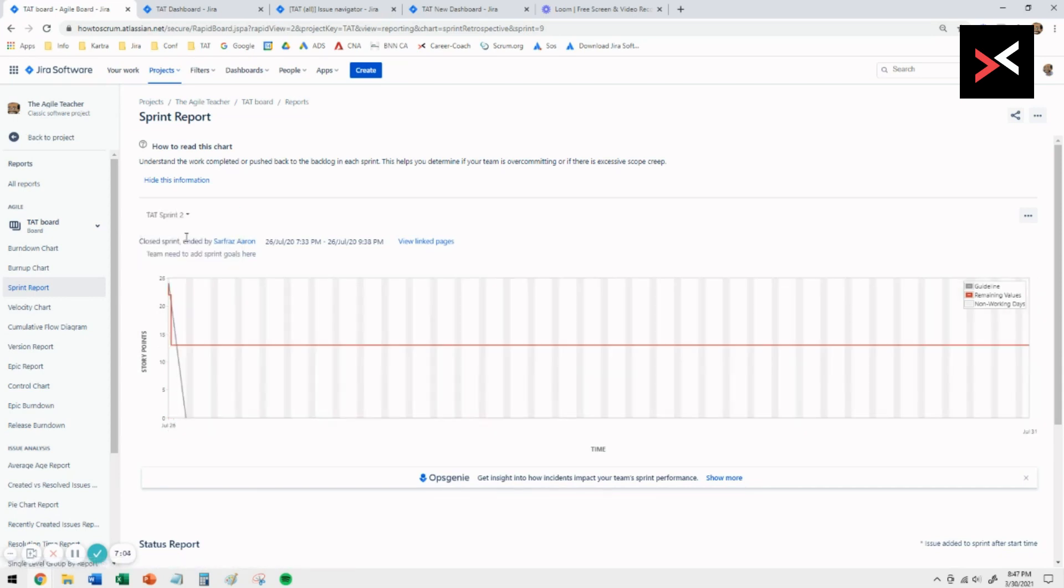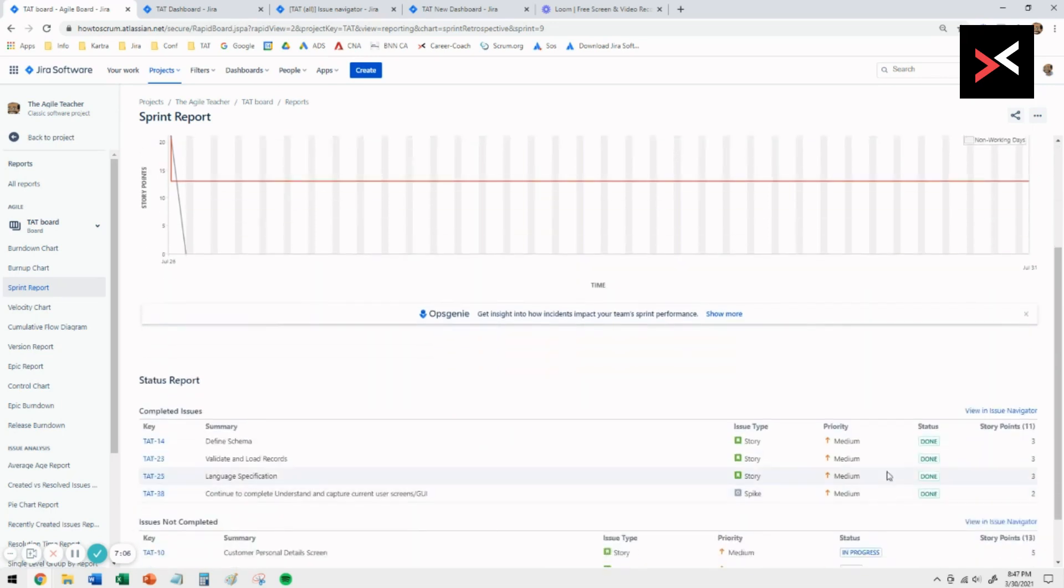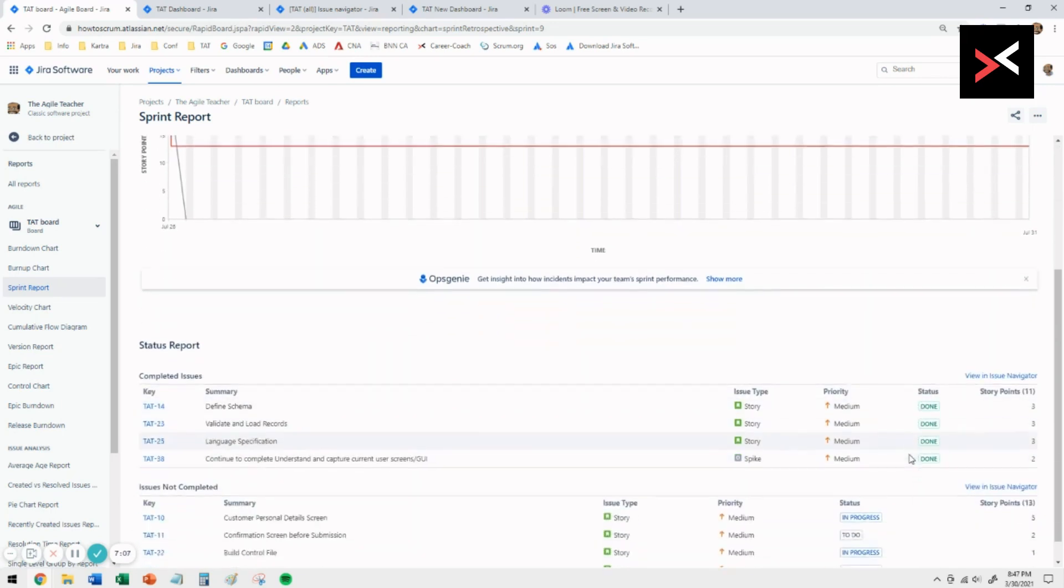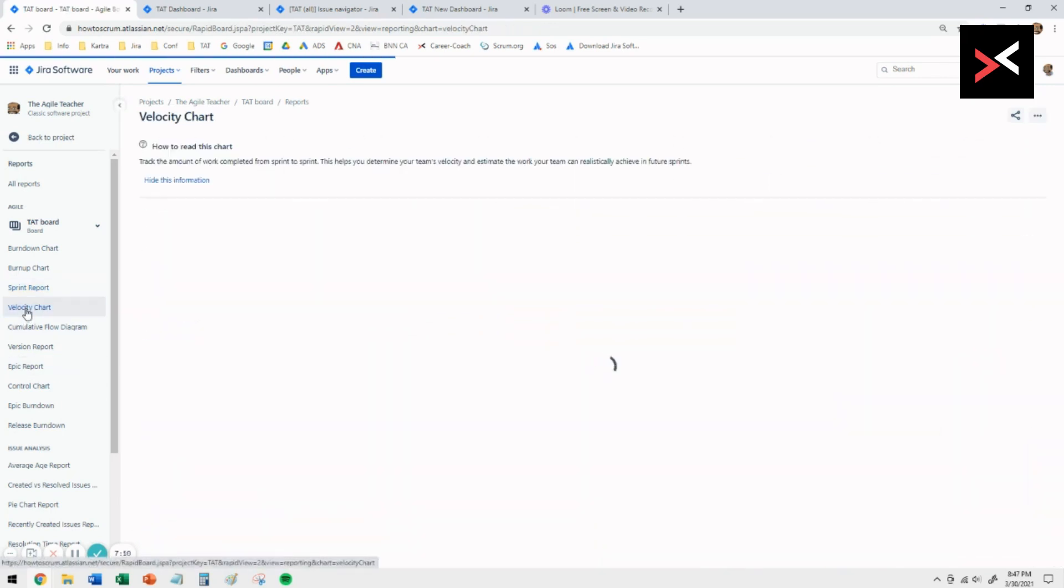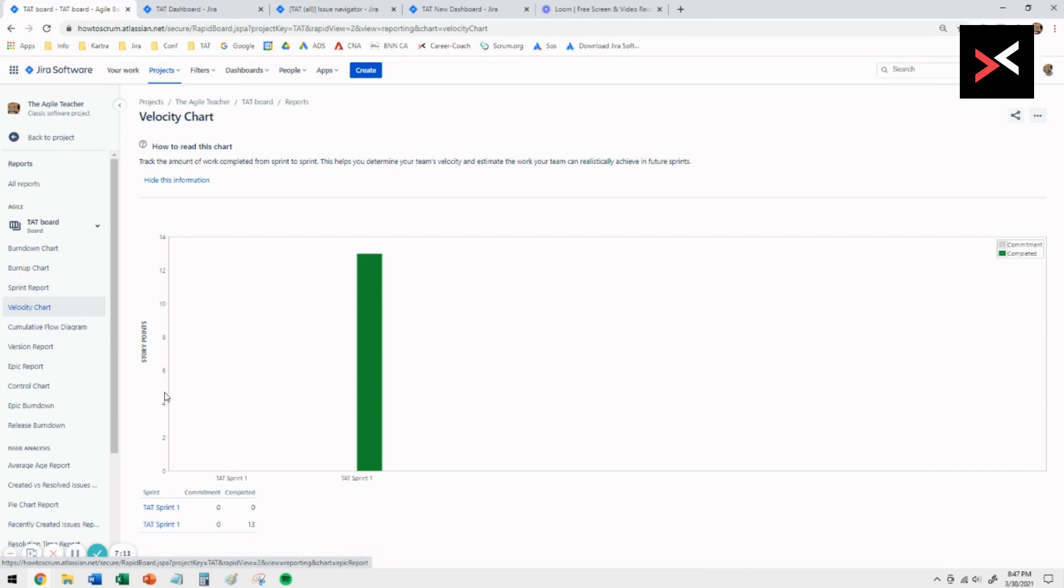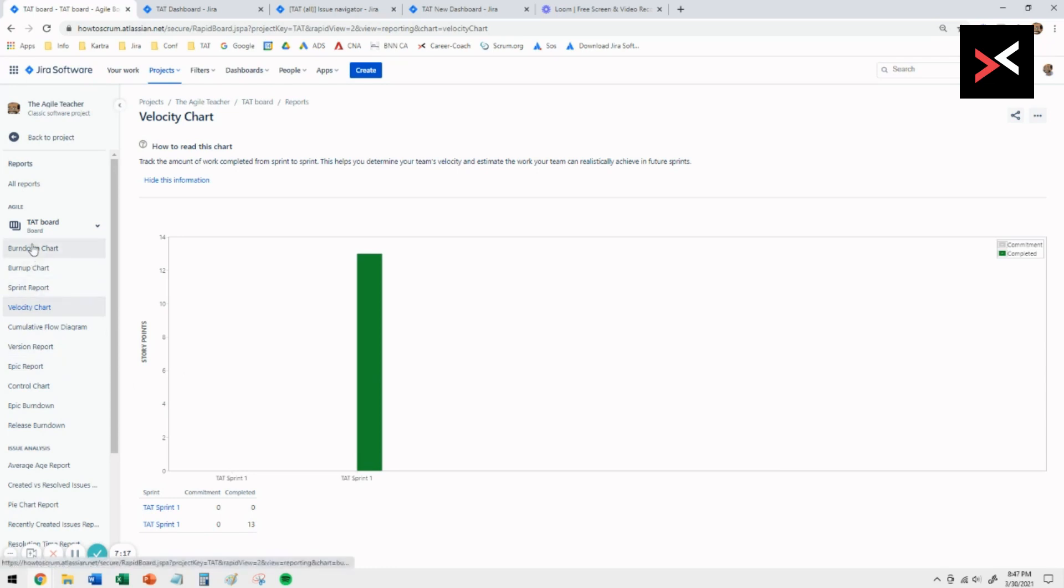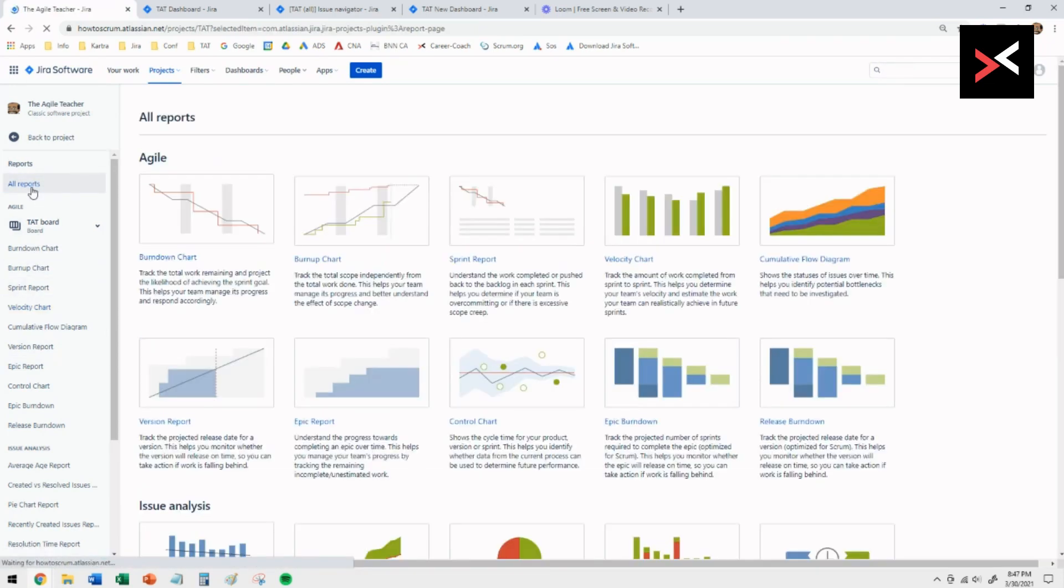You can always click on that, and it'll show you the actual status of that sprint in terms of how many stories were completed and how many weren't. The other useful is the velocity chart, i.e. how many stories the teams said they're going to take on and how many they completed. A very good report to look at as well.